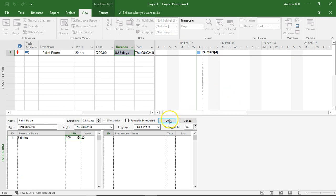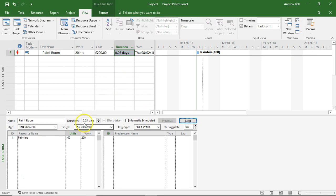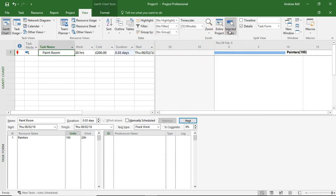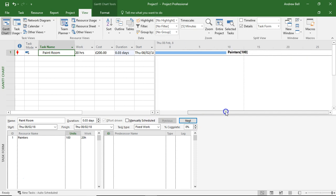the computer is going to tell me it's going to be finished in 0.03 days because I've got 100 painters on the task.